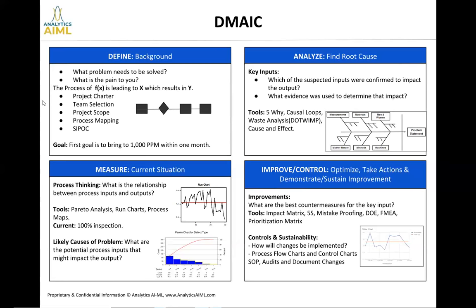During the define phase, we'll really identify what problem are we trying to solve. In cases where we need to do a full-blown Six Sigma project or other type of project, we'll identify the entire project charter, which will include our objectives, our goals, our team selection, the scope, the boundaries of the project, the specific deliverables we expect to get from that project, and basic logistical activities in terms of when that team will meet, how long the event will go, and those sorts of things, your milestones. Okay, so with that said, let's move to another chart here.